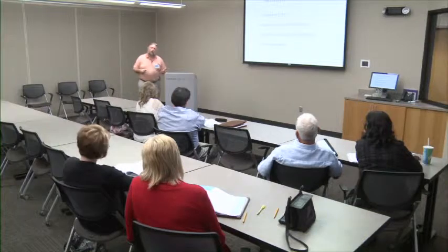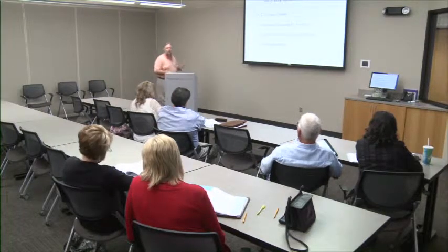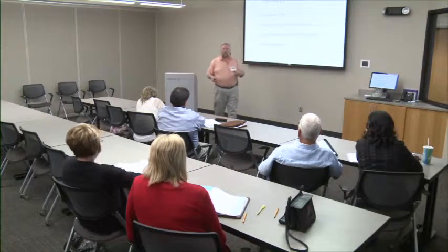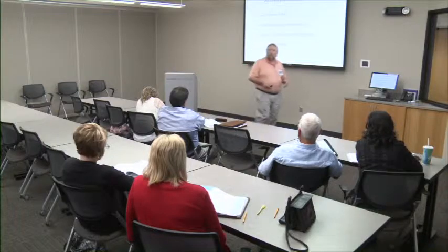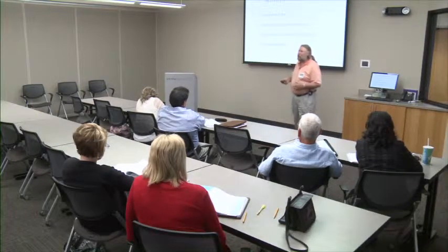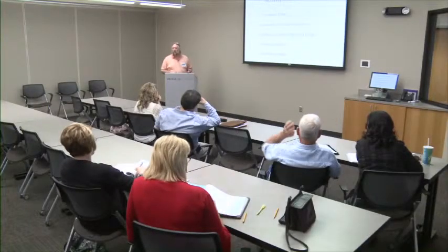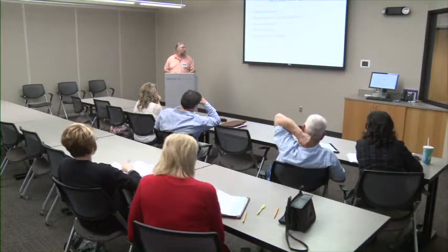But there are certain activities that you can put in there that don't meet this criteria, but usually basically they're start date, finish date, and your milestones that go along the way. They're just a spot to hold up space, but they're activities when you put your program together. Oh, forgot. They are measurable. We can measure the time. If we know that the time takes 3 days, we can measure that we got the 3 days. We know it took 1,000 yards of concrete. We can measure the concrete quantity went in there, or the earthwork, or the sod. So it's a measurable concept as well when we chase it. Okay?